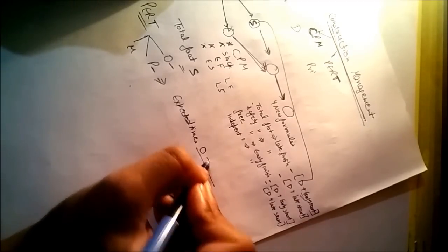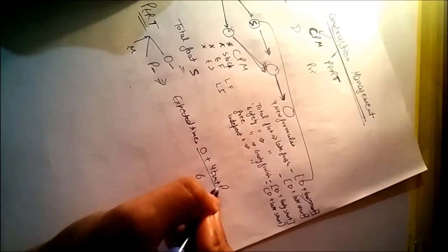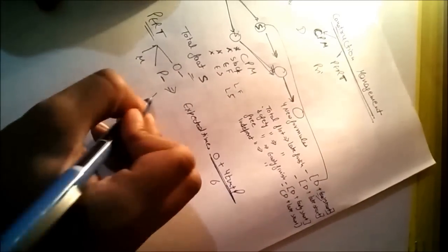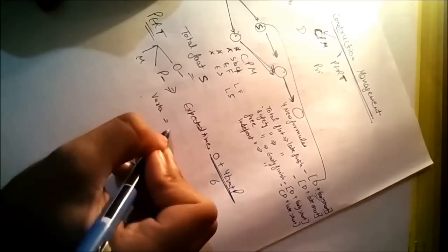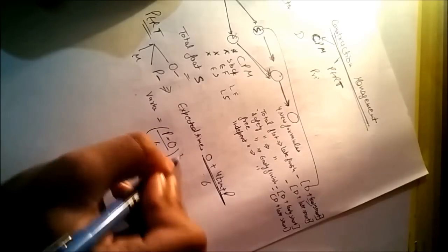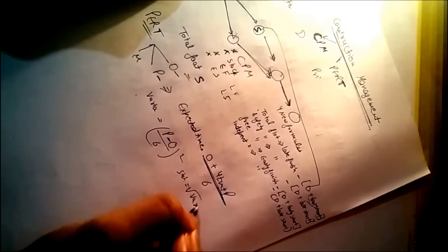That is the simple formula: optimistic time plus 4 Tm plus pessimistic time upon 6. And variance is (P minus O upon 6) whole square, and standard deviation we all know is the square root of variance.